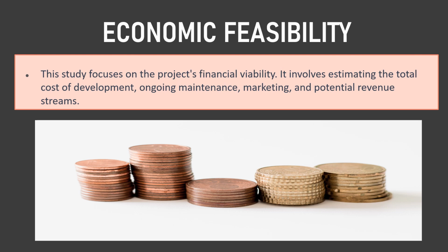In our example, Alex with the team, project manager and PO estimated the development cost, server hosting expenses, marketing budget, and ongoing maintenance costs. They also conducted market research to determine the potential customer base and projected revenue from the app.